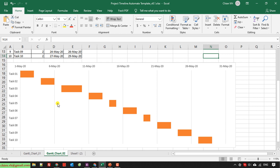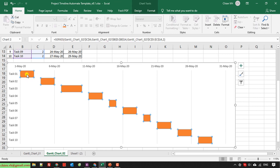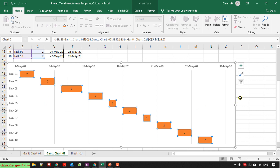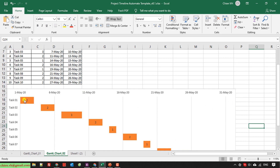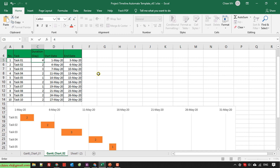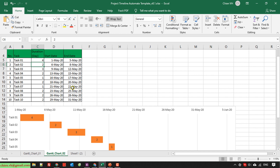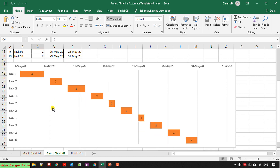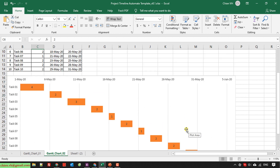In the next step, I will add labels. I select the orange bars, right-click, and select 'Add Data Label.' The labels will now be displayed, indicating the duration of each task in the project. If I change a duration value — for example to 2 or 4 — the label will automatically update, and the bar length will increase automatically without needing manual changes.